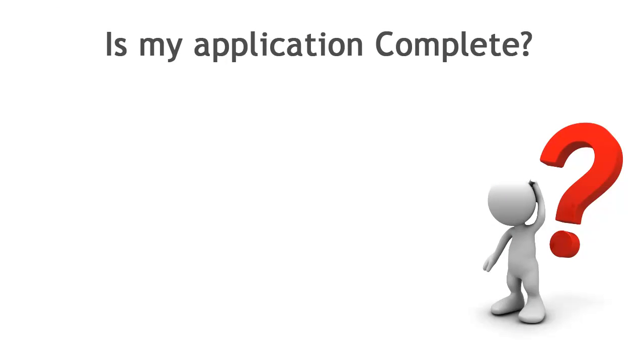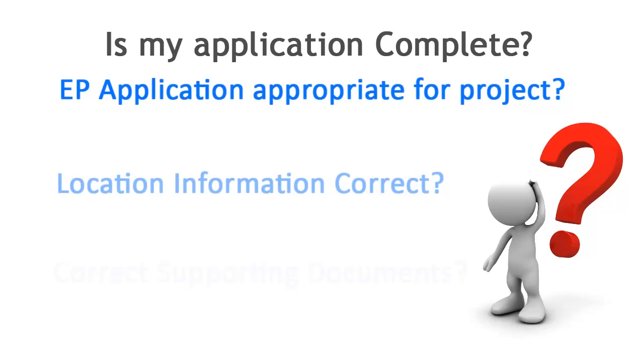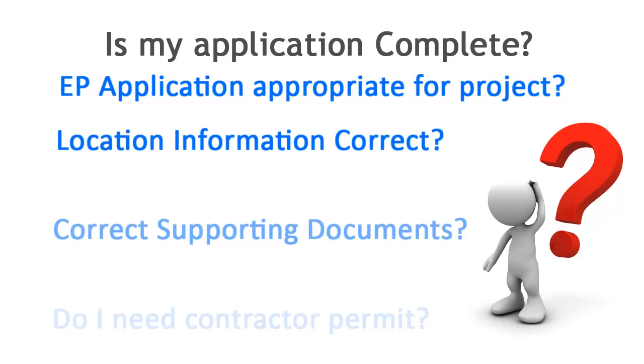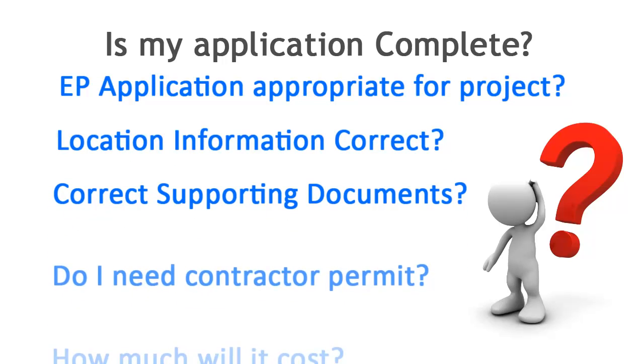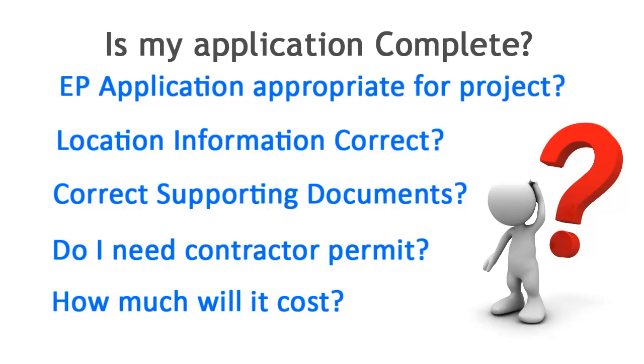When you call the office, you may want to ask the following questions. A. Is the standard encroachment permit application package appropriate for my project? B. Is the county, route, and post mile information correct for my project? C. Do I have the correct supporting documents for my project? D. Does my contractor also need a permit? E. How much will my permit cost?